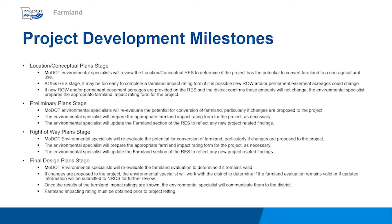When an RES is submitted by the district at the Location Conceptual Plan stage, the Environmental Specialist will determine if there will be impacts to or conversion of farmland. If new right-of-way and/or permanent easement acreages are available, the Environmental Specialist prepares the appropriate farmland impact rating form for the project.